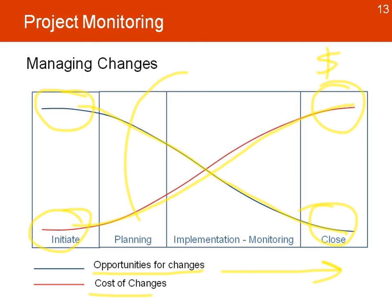Understanding the dynamics between these two curves is important when looking at the project and when we need to focus on opportunities. Right after planning and in the first stages of implementing the project, that's when the project manager needs to look at opportunities to make changes, because the costs won't be that significant. The later it is, the more expensive and the fewer opportunities to make changes.